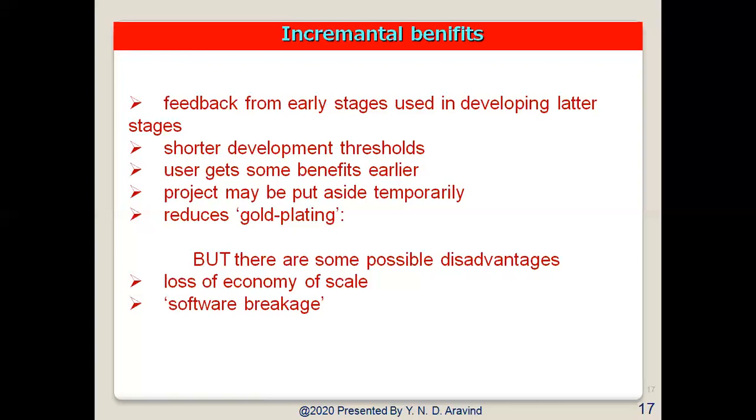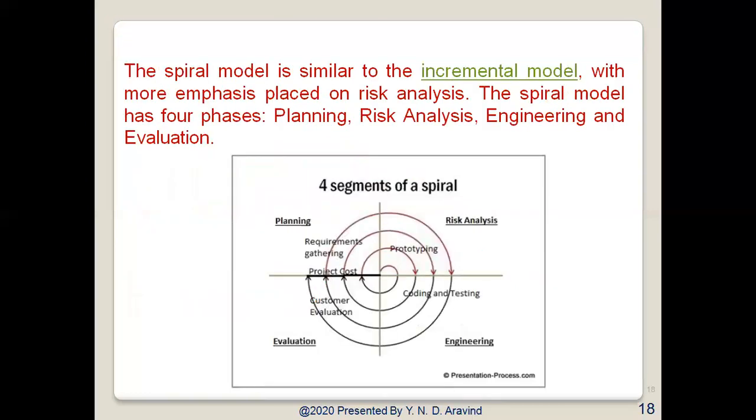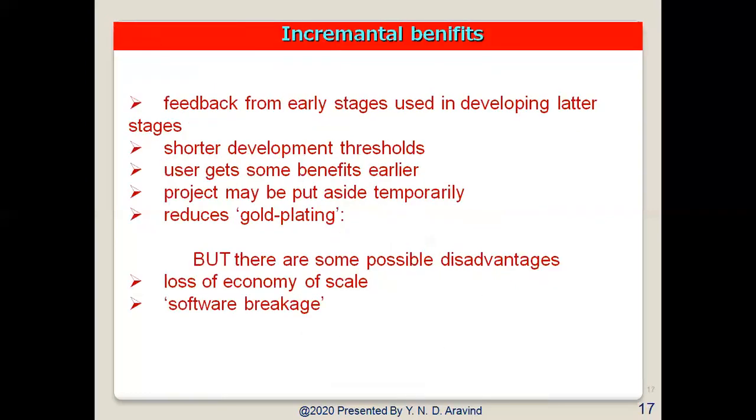And this also has some disadvantages: loss of economy of scale and software breakage. When utilizing a series of mini waterfalls for a small part of the system before moving on to the next increment, there is usually a lack of overall consideration of the business problem and technical requirements for the overall system. Because of this, there may be a loss of economy of scale.